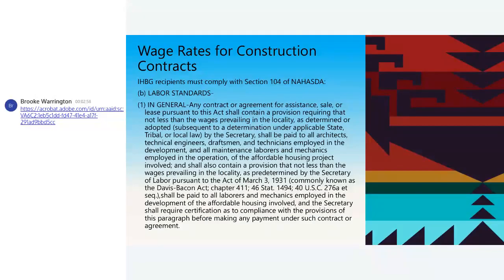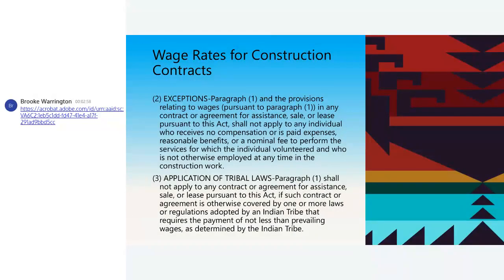They've even made rulings on your flagmen. It's on the site of work. So the rules for your truck drivers are different. They receive Davis-Bacon, but it's only when they're on the site of work, not when they're at the pit. It's when they enter that particular place. There's all sorts of things that you have to make sure you adhere to, that you do those interviews, or that those interviews are being conducted to make sure that they are getting the Davis-Bacon wage rate. Okay. So you have to make sure that they pay Davis-Bacon.